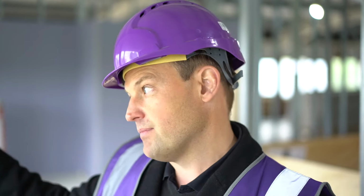As that competitive tender process then comes in, let's say you've got 3 builders pricing for the job. There might be, let's say, 200 items on their tender that you've said, you give them a form of tender, I want these 200 items priced against, so you give me a final price. And we thought of all these things. Here's 200 things we thought of that we need pricing for in that level of detail. When they price against that and you've got 3 set in front of you, it's very easy to compare.